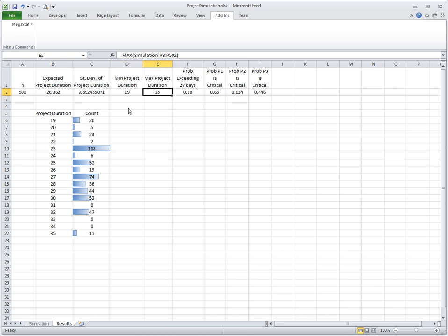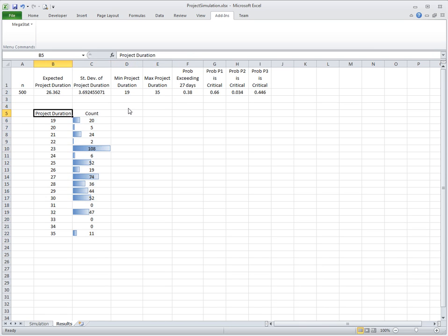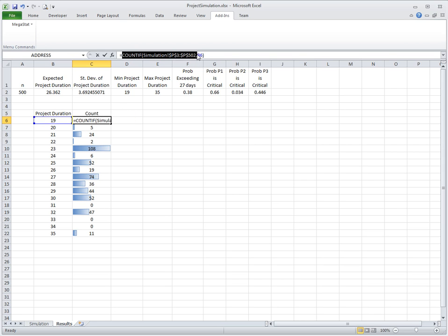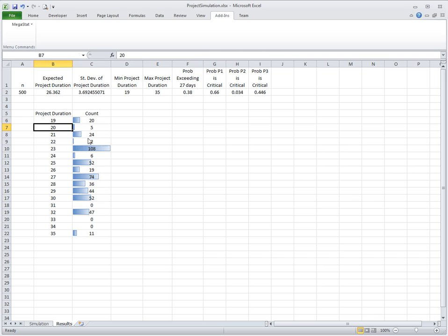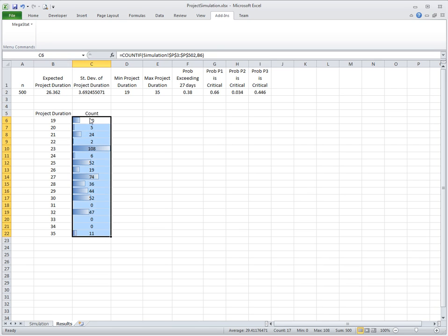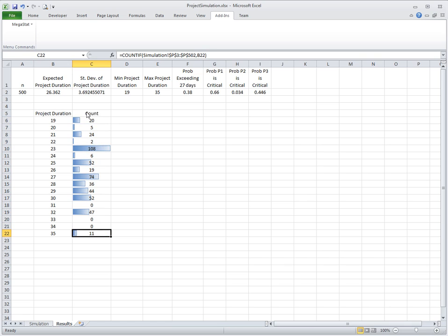There is a minimum for the project duration and maximum. Minimum is 19, maximum is 35. I computed a kind of histogram with a COUNTIF function. The COUNTIF function computes the number of times that this project duration occurs in the simulation experiments. Project duration was 19 twenty times, 20 five times, and so on up to 35. If you use conditional formatting bar on these numbers, you can get kind of a rotated histogram.